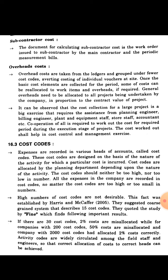Cost codes are allocated by the planning department depending upon the nature of the activity. There are a number of activities like concrete work, steel work, wooden work, glass work, etc. All these different activities are given different cost codes. The cost code should neither be too high nor too low in number, and all expenses in a company are recorded using a cost code.